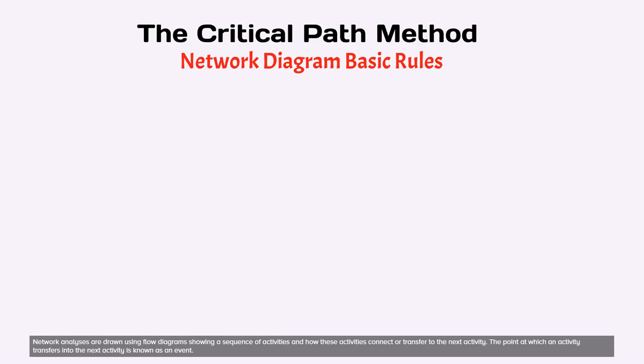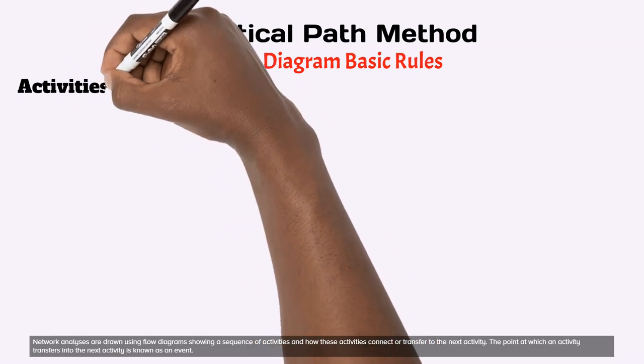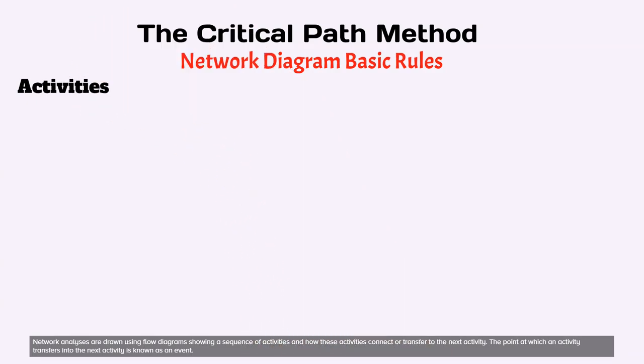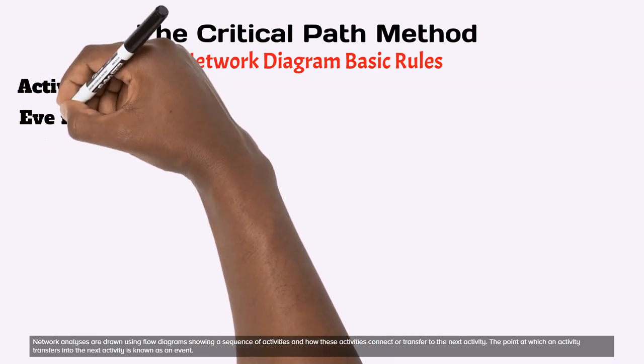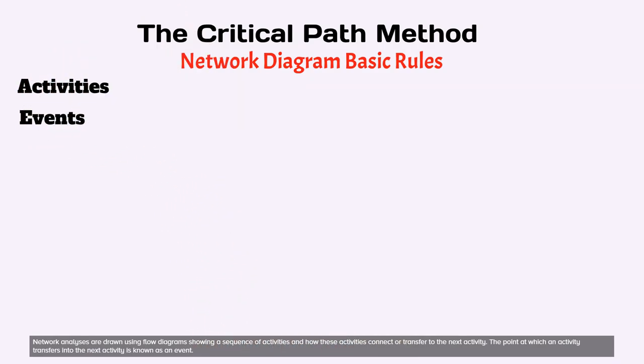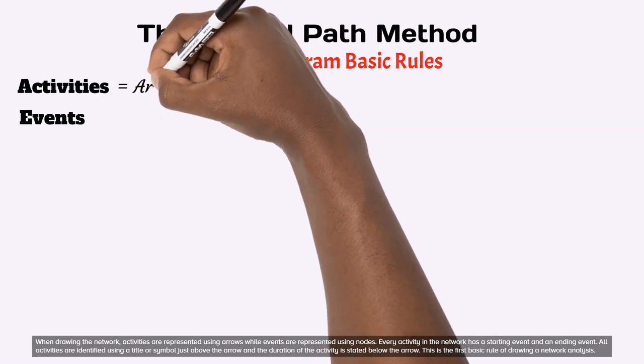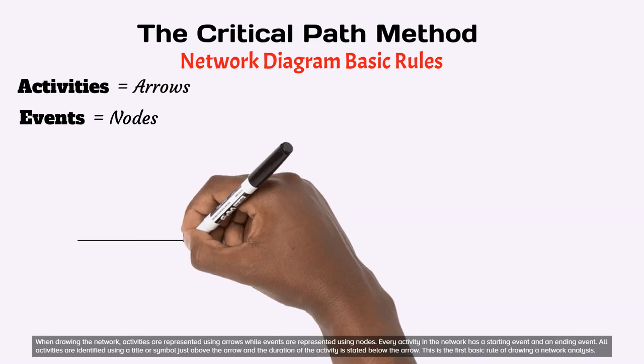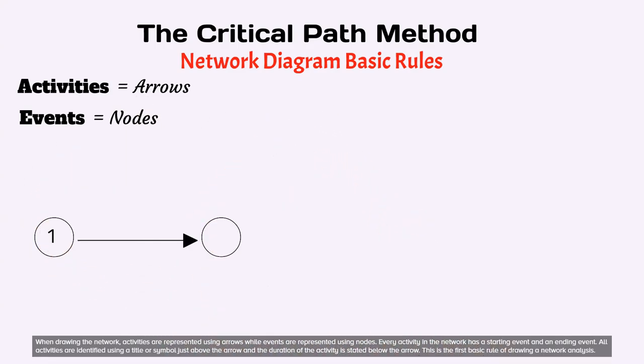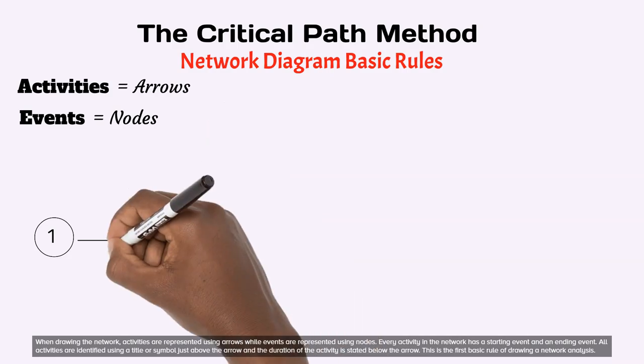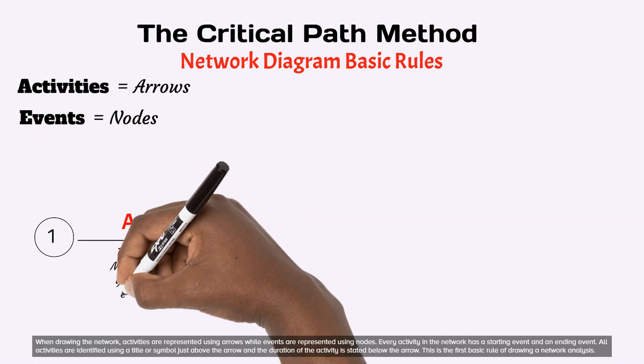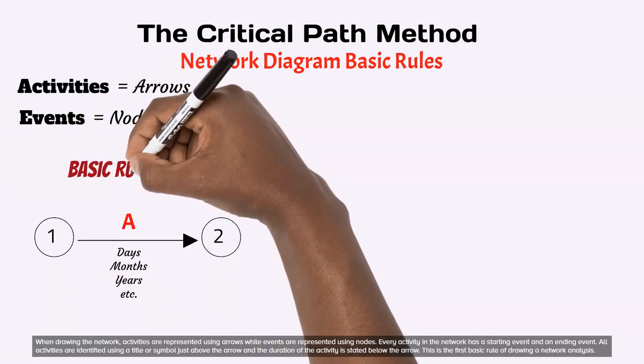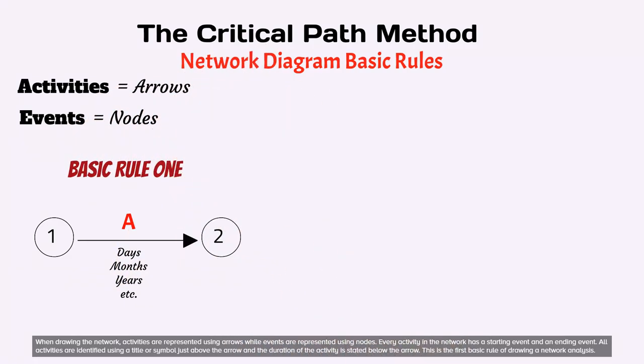Network analyses are drawn using flow diagrams showing a sequence of activities and how these activities connect or transfer to the next activity. The point at which an activity transfers into the next activity is known as an event. When drawing the network, activities are represented using arrows while events are represented using nodes. Every activity in the network has a starting event and an ending event. All activities are identified using a title or symbol just above the arrow and the duration of the activity is stated below the arrow. This is the first basic rule of drawing a network analysis.